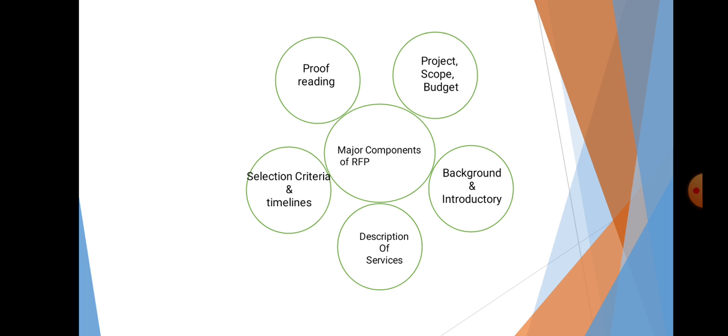The fourth element of the RFP is the details of one company's selection criteria and timelines. Here you can highlight what skills, services, and market expertise are required for consideration. A clear description of selection criteria will help reduce the risk of sorting through multiple RFPs that don't meet your needs. It's also important to be upfront about your timelines. Give potential partners an end date for RFP submission, a date for final submission, and a clear start to finish project timeline so companies making a proposal can fine tune their bids.